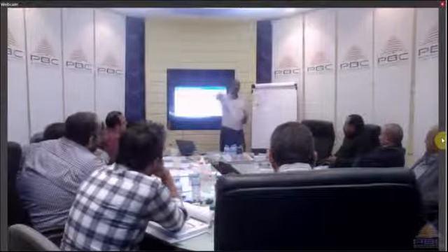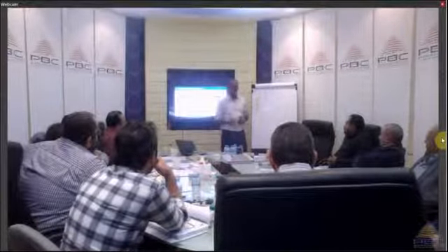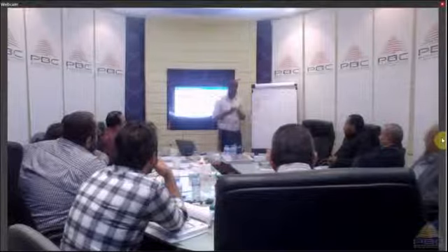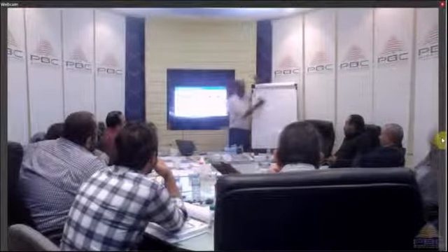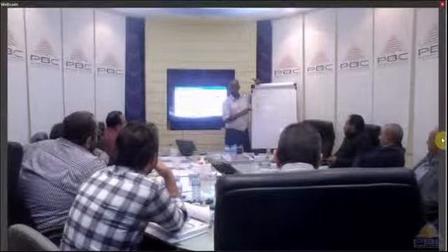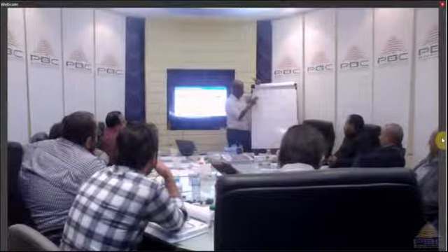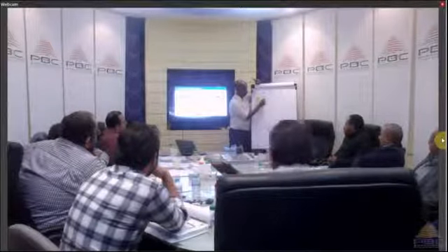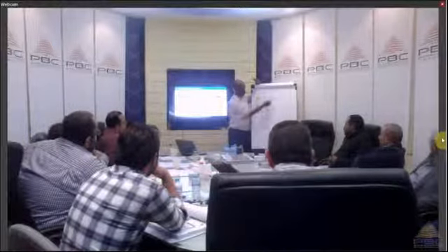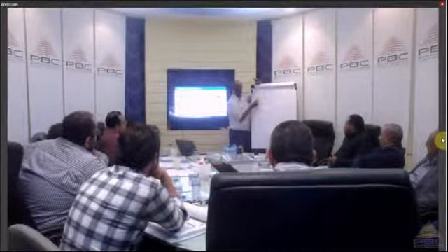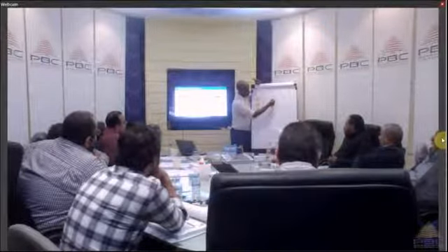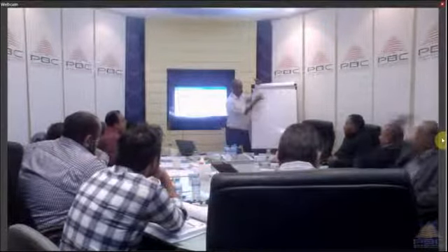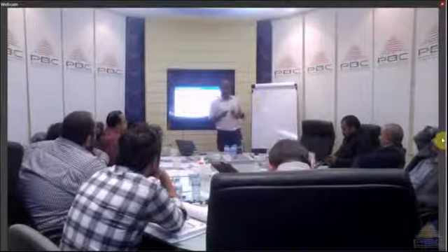This will help us when it comes to cost, because I can just go back to my table and calculate the cost, put in the rates. So 20 labors times 4 days times $100 a day will give me a figure here. Same thing, to rent a crane for 4 days will give me another figure, and so on and so forth, and then I'll be able to calculate my cost.